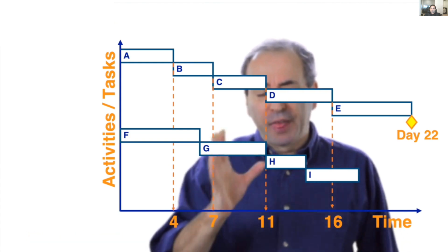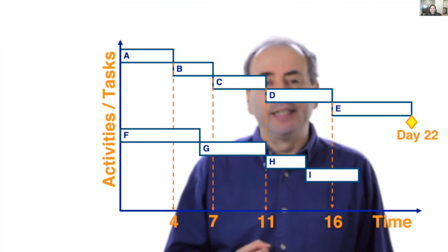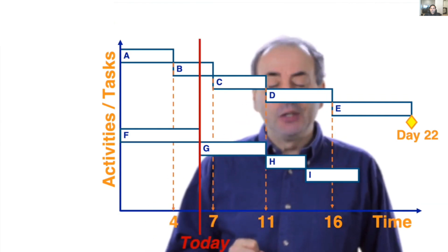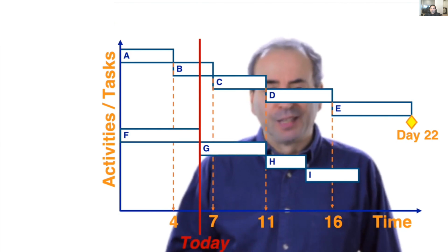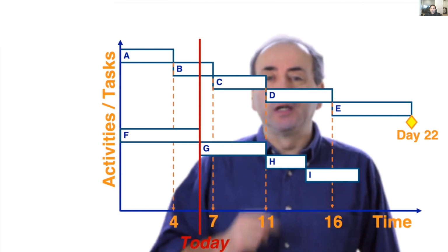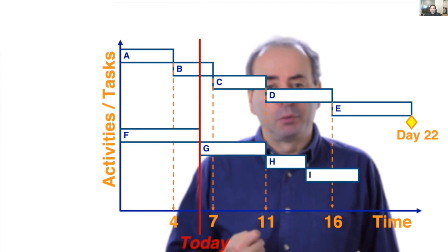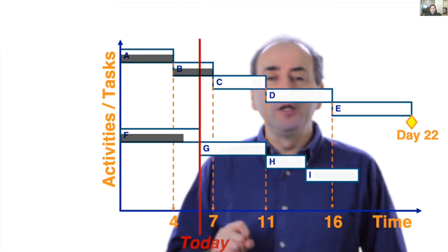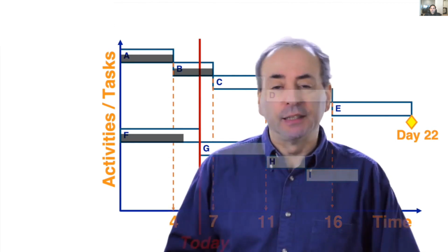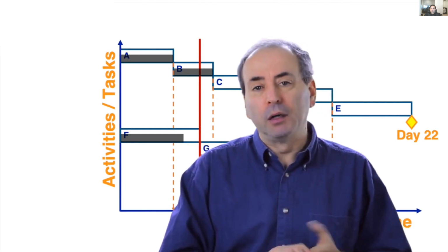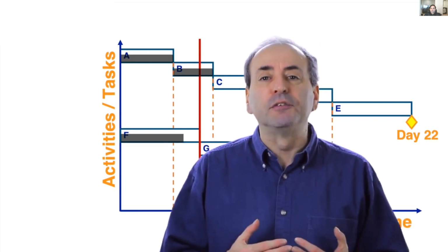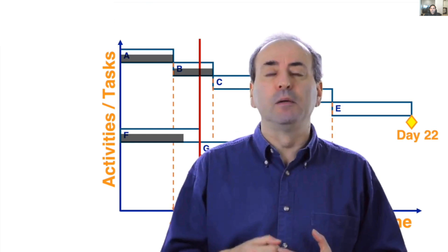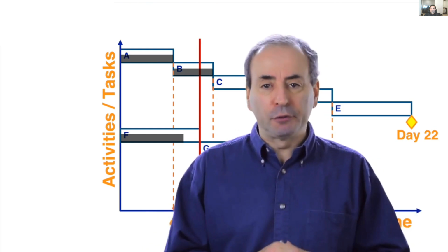And we have a video on what a milestone is as well. So, that's your basic Gantt chart. And it's very easy to read, and we can put a vertical line through the Gantt chart to indicate today. So that at any point in time during our project, we can read off where we should be in our project and then assess the level of completeness. Now, of course, when you look at real Gantt charts produced by sophisticated software, there are often different sorts of bars with different shading. There are sometimes different types of milestones, different shaped symbols. A milestone could be a decision point or a completion or a gateway review, for example.